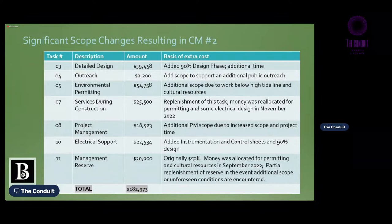They also identified that some of the work was in an area, KP45, which we refer to as the Manette site, and it's listed on the state register. So it immediately elevated cultural resources concerns on this project. And in June, we had a pre-consultation meeting with the Department of Ecology, which consulted with the Suquamish tribe, as well as the Department of Archaeological and Historic Preservation. So there were a lot of stakeholders involved.